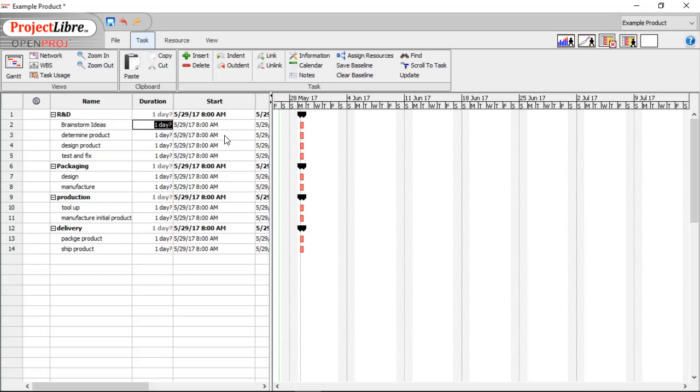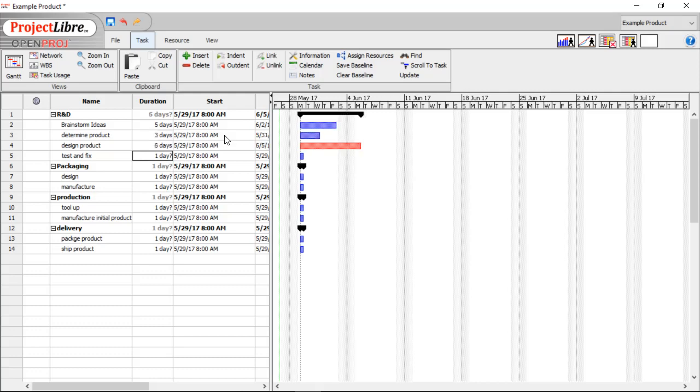So let's put in our Durations. Brainstorming is going to be 5. Determined Product is 3. Design is 6. Test and Fix is 5. And now note that the Summary Tasks, such as R&D, doesn't have a time directly associated with it. It is going to be determined by the durations of everything following it.